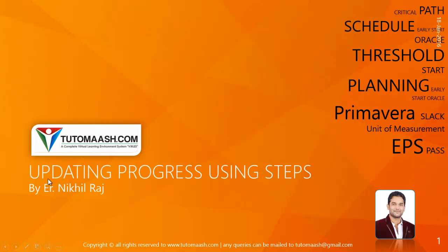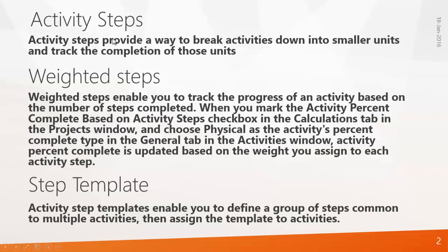In this session, I'm going to demonstrate how to update a project using steps. So what is an activity step? According to Primavera, activity steps provide a way to break activities down into smaller units and track the completion of those units. And weighted steps enable you to track the progress of an activity based on the